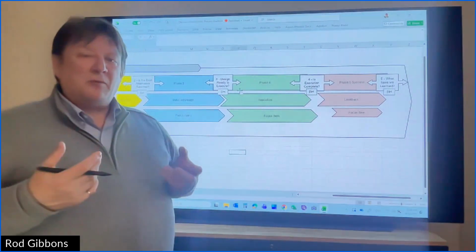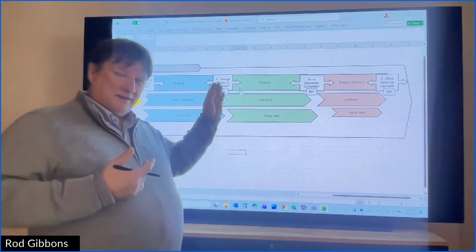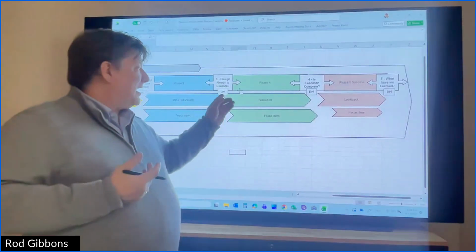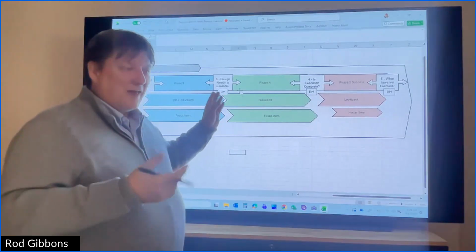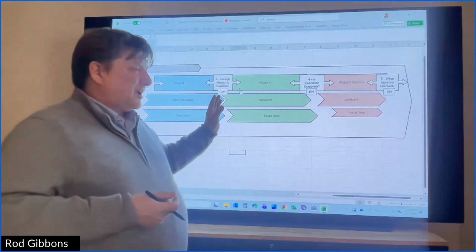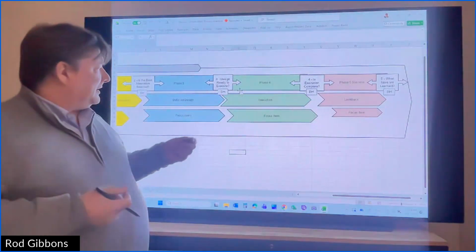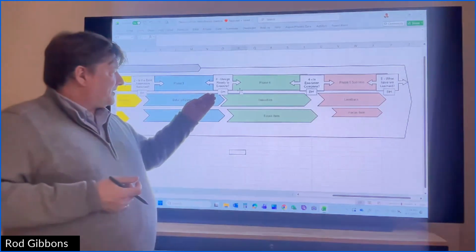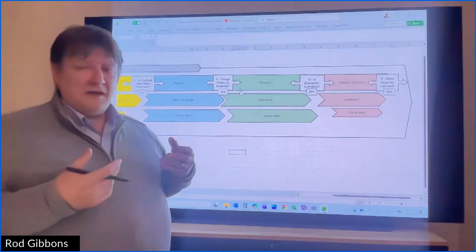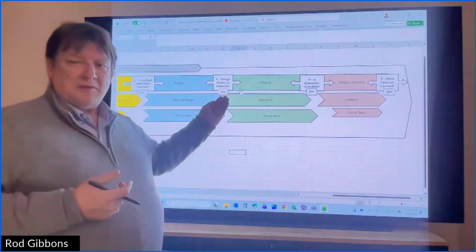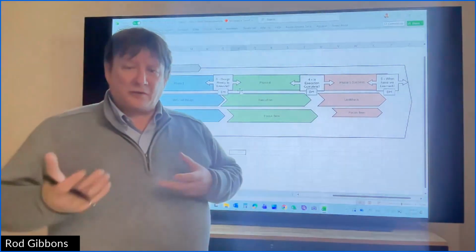Sometimes that might feel uncomfortable if it's an 80-20 solution, but that's why it's clear who the decision maker is, and okay, is there enough work, are they comfortable enough that enough design is done to go and execute? Because it's never 100% done. On that, have detailed design. This is a lot of times you may hear about in the industry, it'd be an AFE. An AFE is an application for expenditure.